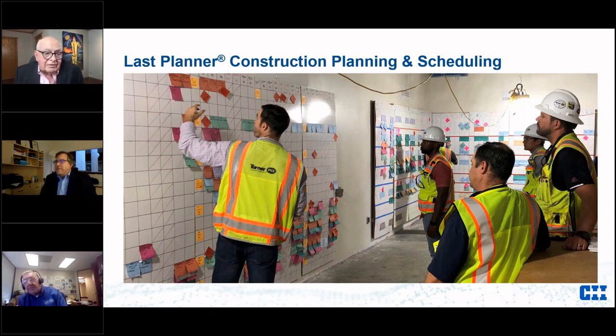Yeah. And John, one other thing about this is that on the construction side of it, it's got to be daily meetings, because those tags get moved. Things change every day in the field. So those tags have to get adjusted, and this has always got to be real. In the design world, it changes, but more on a weekly basis rather than a daily basis. In both cases, we do weekly check-ins and we look back and see what's done and not done and how we have to adjust.